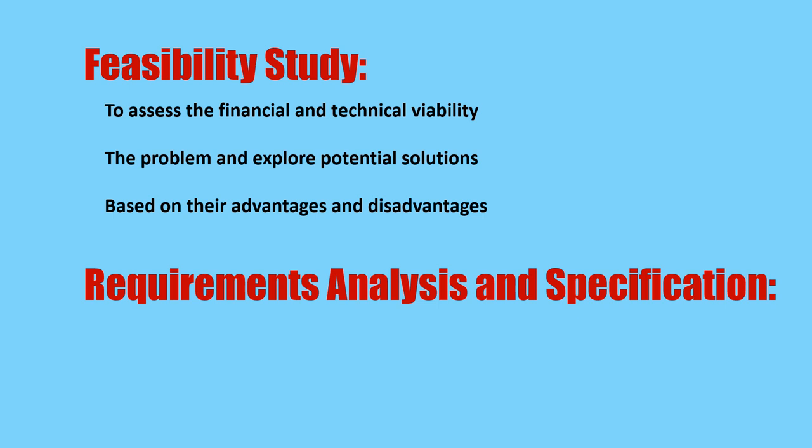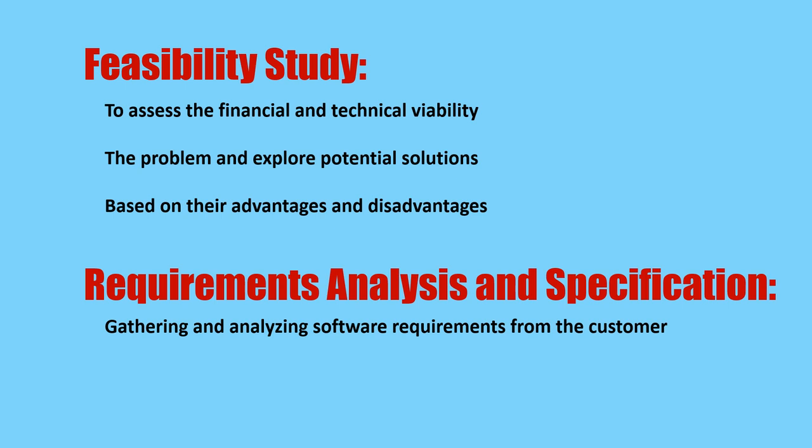Requirement analysis and specification. The requirement analysis and specification phase involves gathering and analyzing software requirements from the customer. The goal is to ensure completeness and consistency in the collected requirements. When analyzed, these requirements are documented in a software requirement specification, SRS, document, serving as a contract between the development team and customers.